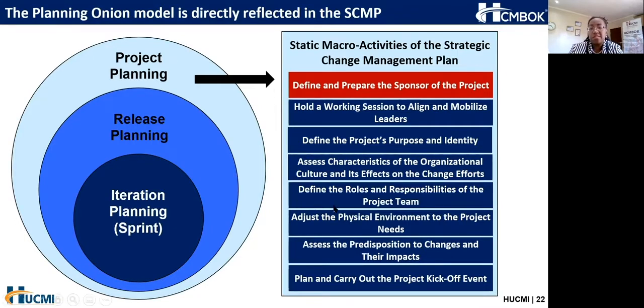Defining the roles and responsibilities of the project team and making sure that you have a RACI matrix that reflects the roles and responsibilities. This is particularly helpful when you have new team members joining in the middle of the project. Adjusting the physical environment to the project needs.